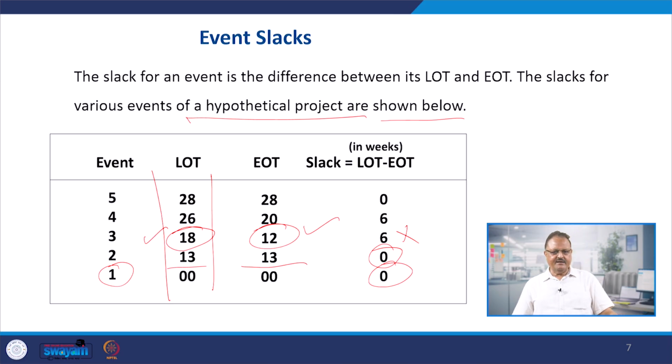In developing the networks or completing projects in the real sense, we have two kinds of cost. One is the direct cost that is required for material, labor and other direct expenses, and then we have the indirect cost, which we normally call the fixed cost. Depreciation, office expenses and administrative expenses are fixed costs. Fixed costs are going to grow with time. So, as the time increases, fixed cost also increases. So it has a linear relationship.